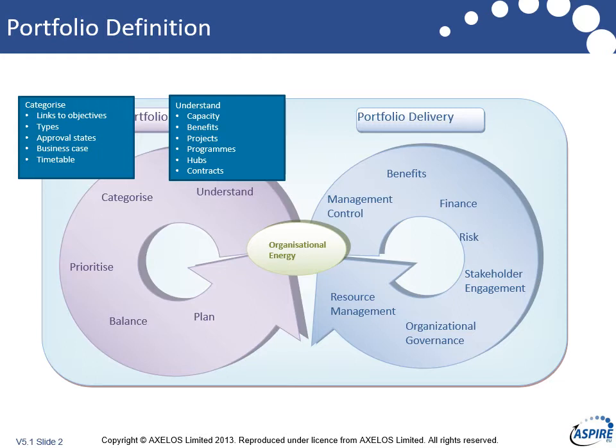If we've got budgets against them, have they got business cases, have they got a timetable? From that we can draw together an understanding of the whole portfolio. Have we got a lot of IT projects, FM projects, operational projects — how is the portfolio currently aligned? Because when we come on to balance, we may need to do some adjustments. What we're looking for here is basically simple tracking techniques that categorize projects against those five headings and any other ones that are relevant.